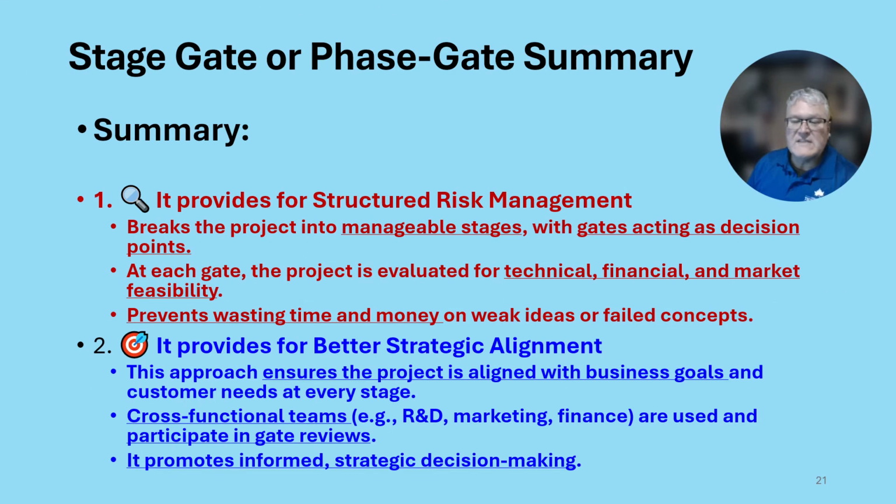Here's a summary of the stage gate or phase gate approach. It provides for structured risk management. It breaks the project into manageable stages, with gates acting as decision points. At each gate, the project is evaluated for technical, financial, and market feasibility. It prevents wasting time and money on weak ideas or failed concepts.